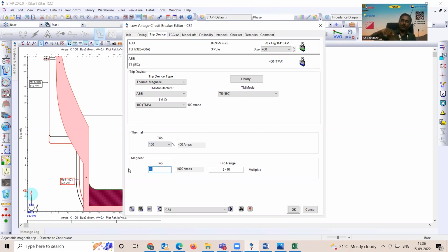If you understand, when you are doing a relay coordination, you cannot change the release or a motor, because that's already ordered. It was already manufactured, manufacturing clearance is given, and this might be arriving at site, or this might have already reached the site. And after everything has reached site, changing this release or changing the motor, I don't think it's practically possible. Technically it may be possible, but commercially it is definitely not feasible for EPC contractors.